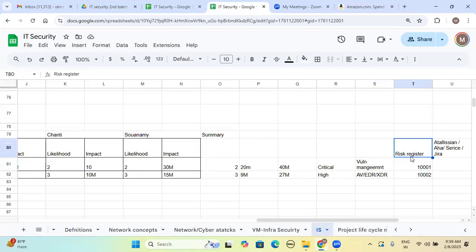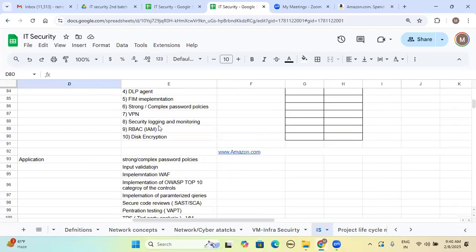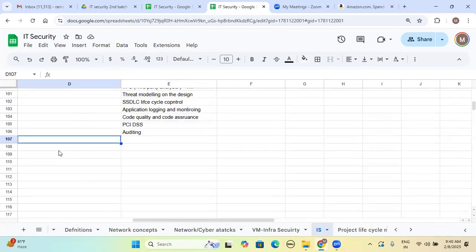So that is called a risk register. A risk register provides the status of the risk: what is the active status of the risk, tracking and monitoring, and final closing of the risk. Till the closure of the risk, we have to continuously ask for updates from the respective stakeholder. Same as it is, whatever assessment you are doing on the cloud security side, this on the server side, this on the application side, maybe cloud security assessment, cloud instance analysis or risk assessment.